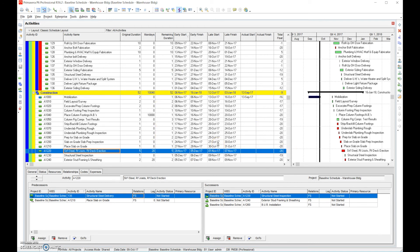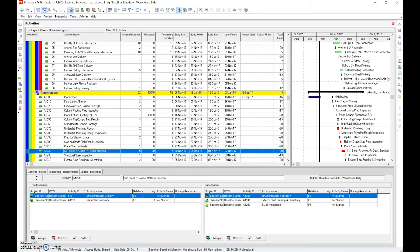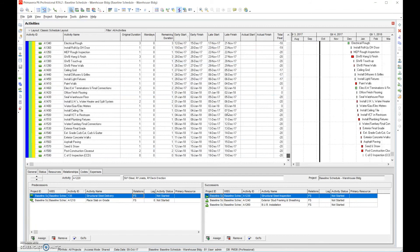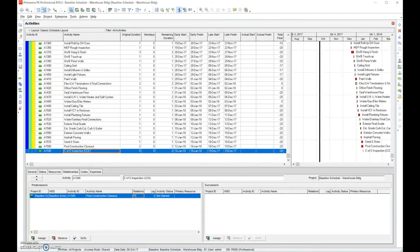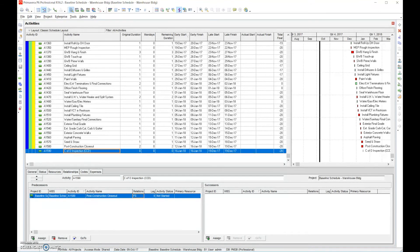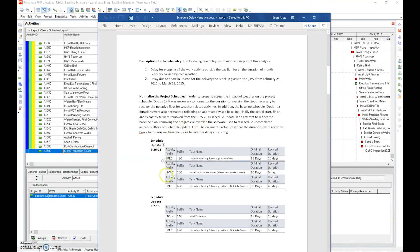Because if you go do a blow-by-blow analysis, somebody on the other side that's analyzing it could say, hey, I've looked at this, and I've ran through the same analysis. They could take that existing schedule, run through the same steps you took, and come up with the same answer. It's very common that people will try to pull the wool over people's eyes when it comes to delay impacts. So we want to make it and we want to spell it out clearly, so they know exactly what we did, we clearly and concisely documented what we did, and why we did it, so that someone could independently do that.